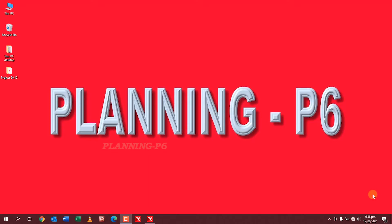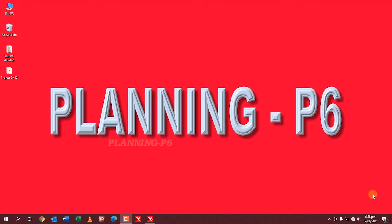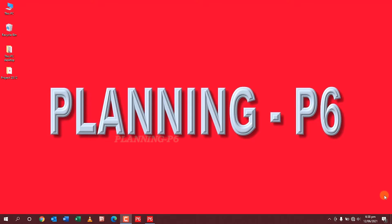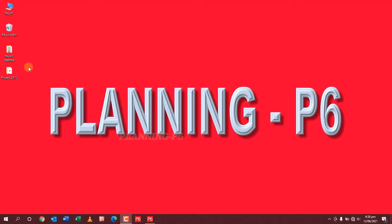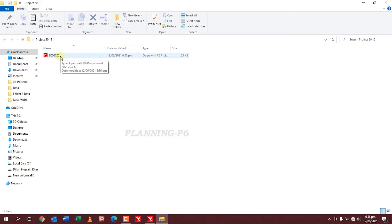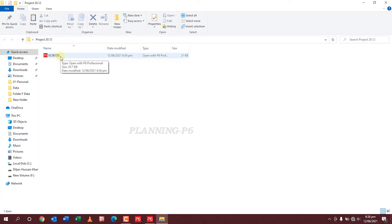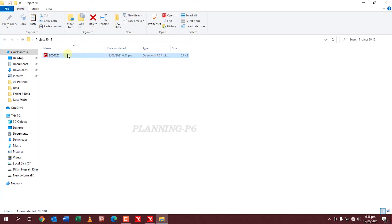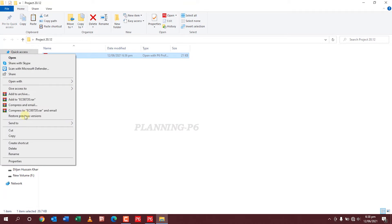Here's how to import an XER file created in a newer version of P6. First, locate the XER file you wish to import to Primavera P6. Like this is the file I want to import. This is in version 20.12. I want to import it in version 18.8. Click on it and open with.